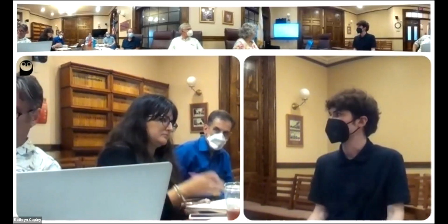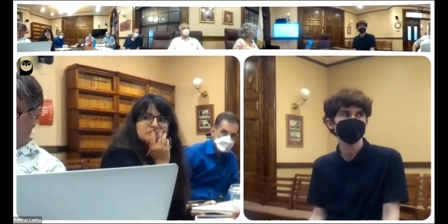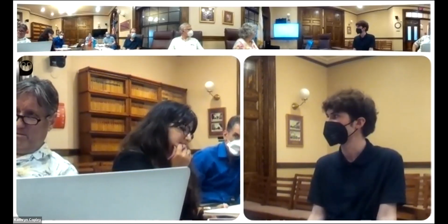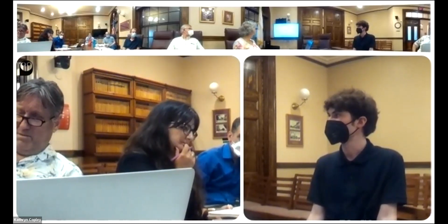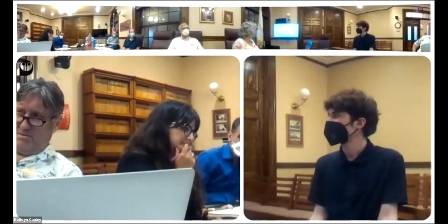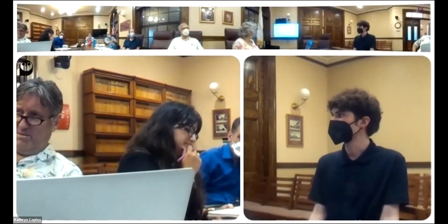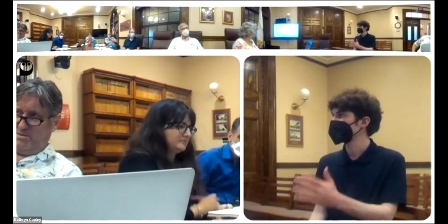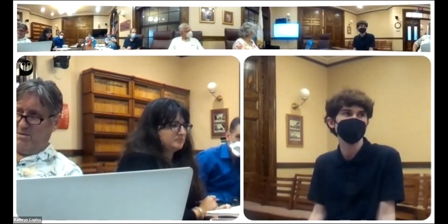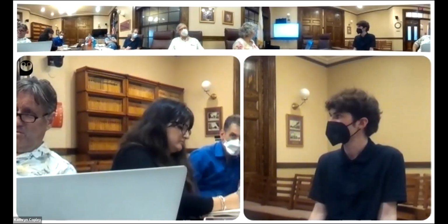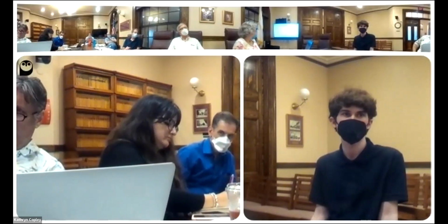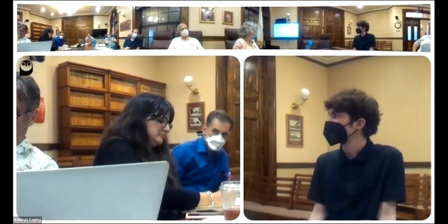The National Renewable Energy Laboratory has a quick calculator tool that allows you to put in some statistics about a proposed array and have an estimated generation. With 400-watt panels, this many panels would produce more than the treatment plant consumed. And with 500-watt panels, it would be even more. So the thinking is we wouldn't need to have that much. And indeed, with 500-watt panels, the building consumption could be equaled with half that number of panels. So the project size in the last image could be reduced to not displace that many trees as was pictured.